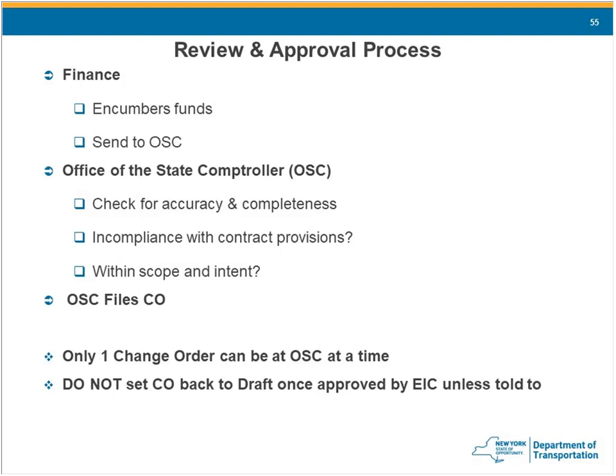And OSC goes through it with a fine-tooth comb, even though we've all done that. They review everything, and there are times that they will ask questions. When they ask questions, usually what I've seen is they give you 3 days to answer, or else they're going to kick it back and deny it. And correct me if I'm wrong, Eric, once the change order has been denied by OSC, it cannot be deleted. It can only be redone as a new change order with the answers or issues addressed. But it will always be in the pipeline and in Site Manager as a denied change order.